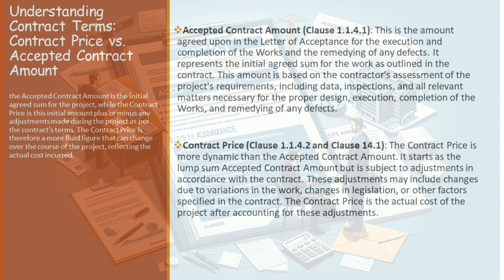Now, let's shift our focus to the contract price, as outlined in clauses 1.1.4.2 and 14.1. The contract price starts its life as the accepted contract amount, but it doesn't stay static. It's a dynamic figure, subject to adjustments as the project progresses. These adjustments can be due to various factors, such as changes in work scope, legislative changes, or other specific conditions outlined in the contract.